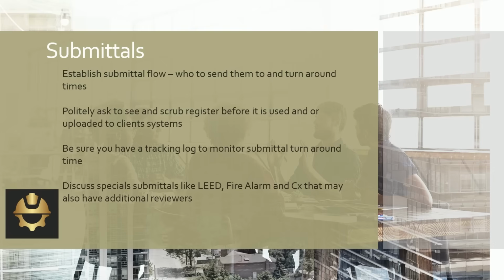The other piece of this is to have a tracking log to monitor review time for the designers. And some software is set up where you can have multiple reviewers and you can track the submittal from cradle to grave, when you get it from a sub all the way through it being approved by the client. But sometimes you're working with systems that don't have that. And again, QCS RMS is one of those. That tracks the time with core review only. That's not going to give you the time tracking on the designers or any of those specialty reviewers that Greg mentioned. So it's going to be really important that you have that tracking mechanism so that you can explain to your site team and your project manager where the holdups are.